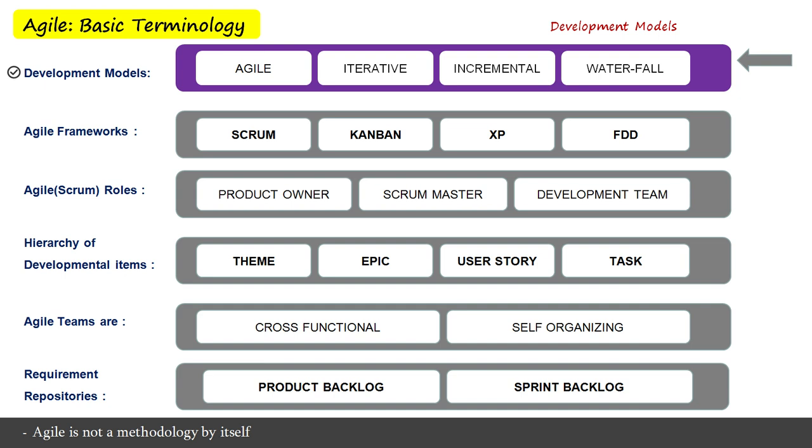The complete requirements of the project are planned only at the requirements gathering phase. Once they are defined, the development team is confined to work only on those requirements and their scope till the end of the project. The project is executed in a controlled fashion where the project manager fully controls the project execution and the development teams. This model is suitable when the project scope can be defined well at the beginning and will not deviate going forward.